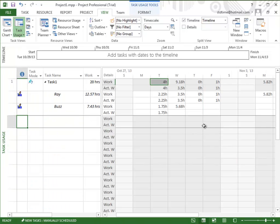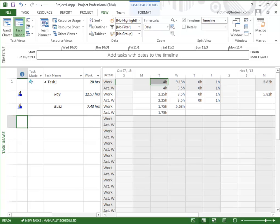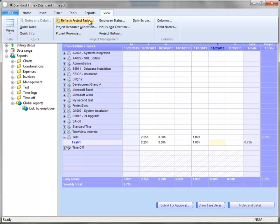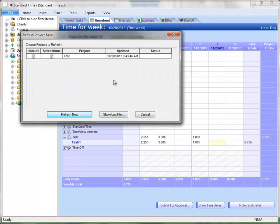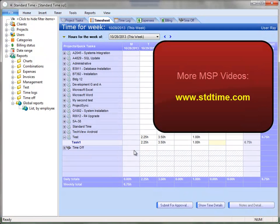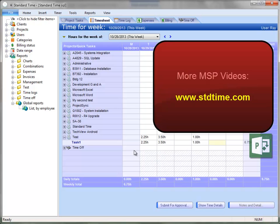And in the task usage view, you see the one hour that came over. So this is how the actual work from the Standard Time timesheet is processed and managed by Microsoft Project. So as you type your hours into the daily timesheet in Standard Time, you integrate that with Microsoft Project. Those hours will go into the time-phased task usage view on Microsoft Project. Hopefully that helps and lets you know where these hours are processed.